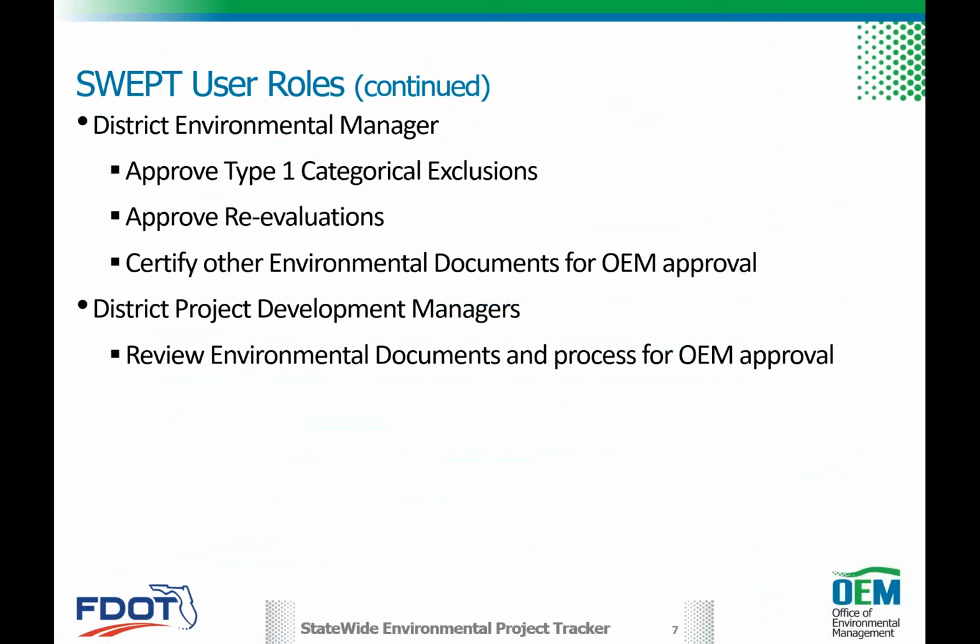Depending on the nature and complexity of a reevaluation, and coordination on the reevaluation with your project delivery coordinator, some reevaluations can go through the consultative process and be completely signed off in the district, or they have to be elevated up to OEM for routing and approval.